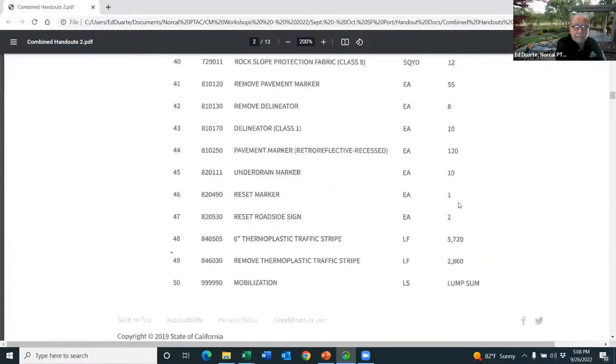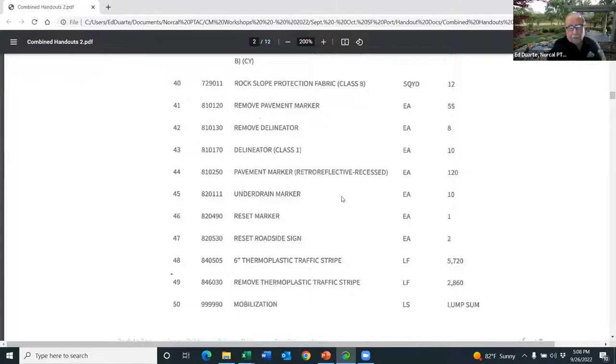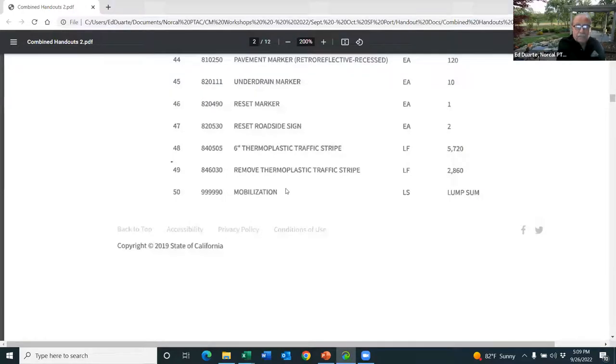Oh, I don't have it. Sorry. The bid proposal form will have these same items all in one continuous list with a place to enter a unit price and an extension. So one of the problems that primes have with inexperienced subcontractors is that, let's say that underground contractor, he gives them a lump sum price for all those items. That doesn't do him any good, because he's got to give individual prices. And your price as a lump sum might look reasonable, but I have no way of breaking it up into those seven categories unless you tell me. So it's just crucial that you follow the prime contractor's bid proposal format.